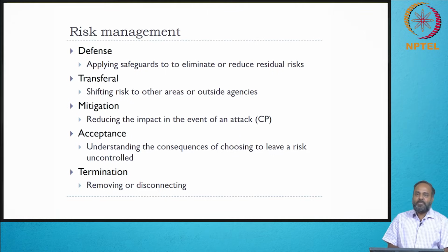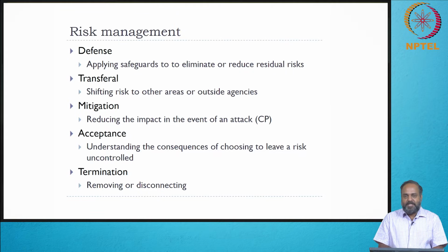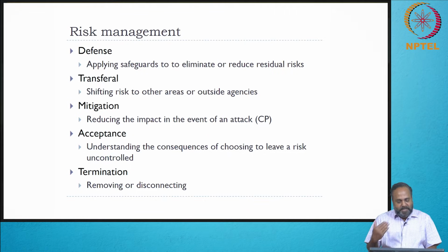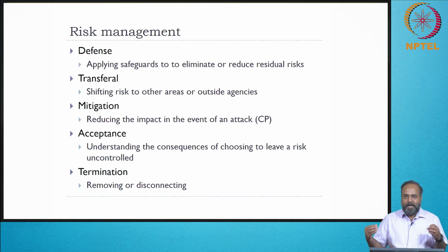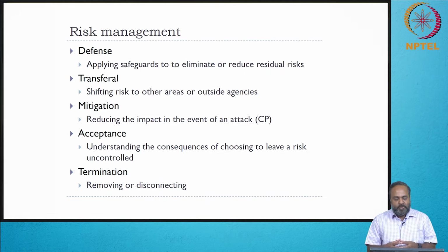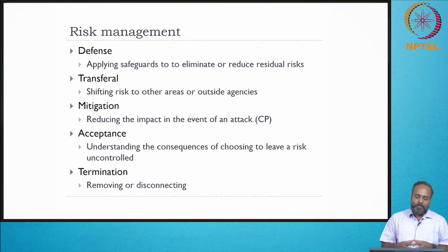So assume that you have assessed risk for each asset. The unit is asset, so you go by asset. Each asset has a vulnerability and each asset has a value. You arrive at the vulnerability by mapping each asset to a threat, and then you assess the vulnerability of each asset. So we have a TVA worksheet, and finally, you also calculate the risk pertaining to each asset.